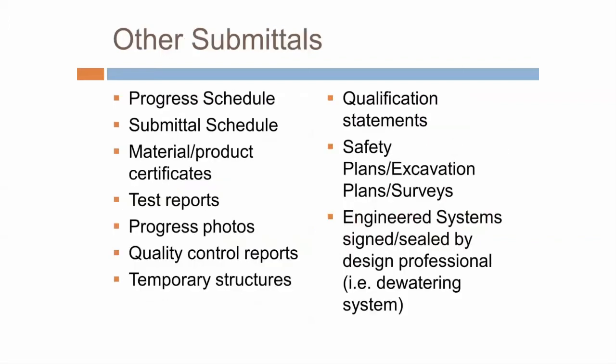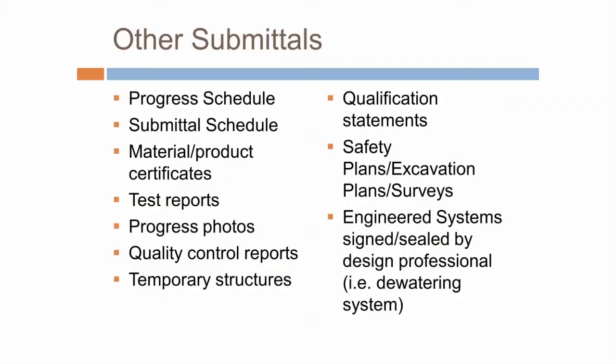There are other types of submittals. Things like progress schedules, material and product certificates, test reports, and photos — typically required periodically to demonstrate progress on the project. Quality control reports. Temporary structures gets an asterisk — that has a hybrid we'll talk about later. Qualification statements, safety plans, excavation plans, surveys. All of these are submittals that the contract documents typically require the contractor to submit. But would you really approve them the same way you would approve a shop drawing? The answer is really no.